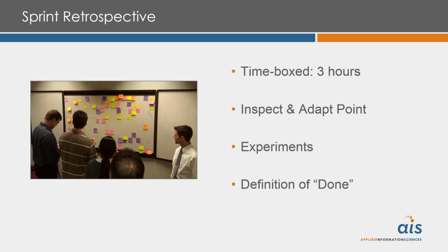Now, based on what we find, based on the data that we gather, we want to come out of this thing with an experiment or one or a few experiments that we're going to try in the next sprint. Now, I use the word experiments because that's really what these are. These should be actual, tangible things you can talk about and say, hey, these are occurring that you want to do in the next sprint. It's not we want to communicate more, we want to do more tests. It's we're going to get together every third day and talk with XYZ people. We're going to have at least 3 user reviews or usability studies as a part of the next sprint to see how that impacts the quality of our product. These are experiments that you can take in and then finally at the end of the next sprint, again, inspect on those experiments.